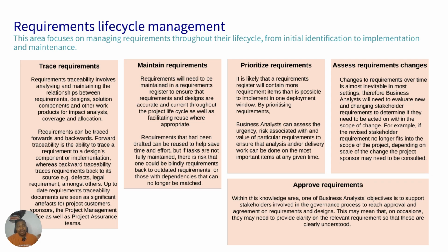If I'm using impact, consideration, or ease, or maybe the t-shirt size, or ranking or grouping, I'll then say, okay, this is not top priority because there are other requirements that are top priority for us. We then rank it low and put it in our backlog to be fixed later, right? That is what prioritization of requirements actually means.